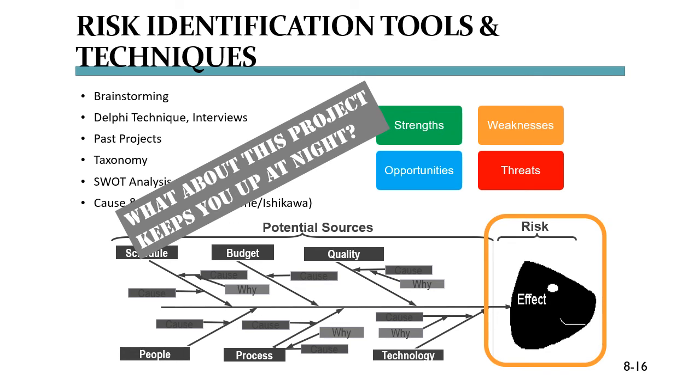The actual risk impact is the head of the fish, where we post our major risk. The drivers can fall into a number of categories. Sometimes you may even already see them on the Post-it notes on the whiteboard. Those categories become the major bones in the fish's skeleton, and all the risk drivers or root causes on the board can go in any of these categories. Then we ask why for each reason a number of times and answer because this and that. That way, you can dig deeper and deeper into those root causes and find the most consequential and financially expedient driver to tackle first.